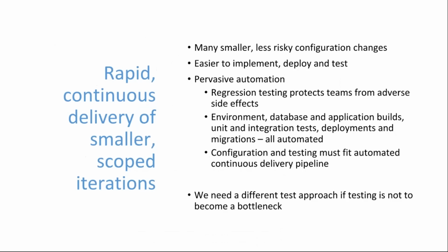I mean, firstly, we're being less ambitious each time. We have a much smaller scope of delivery. And the principle from that would be that if we take on such a small piece of scope, then the risk of failure usually is reduced, the first thing. Also, if we make an error or a screw up or whatever, the rollback of a smaller implementation is more straightforward than taking a huge deployment and unwinding it back to a previous state.